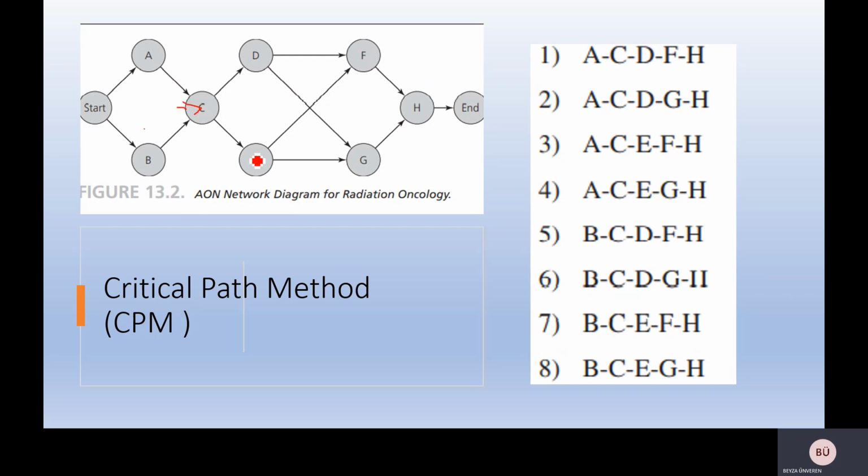Activities D and E cannot be started until activity C is finished. In the ensuing section, activities F and G cannot start before activities D and E are finished. Finally, activity H can start once activities F and G are finished.